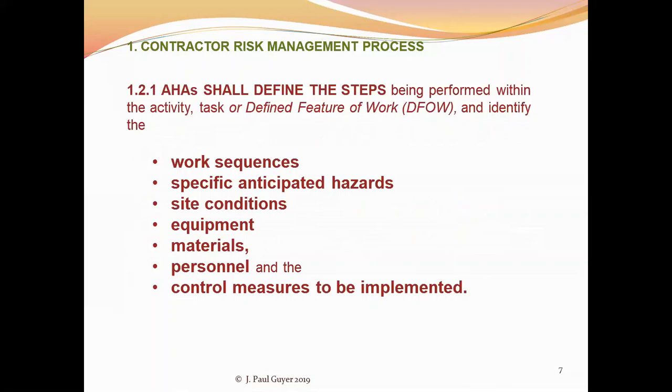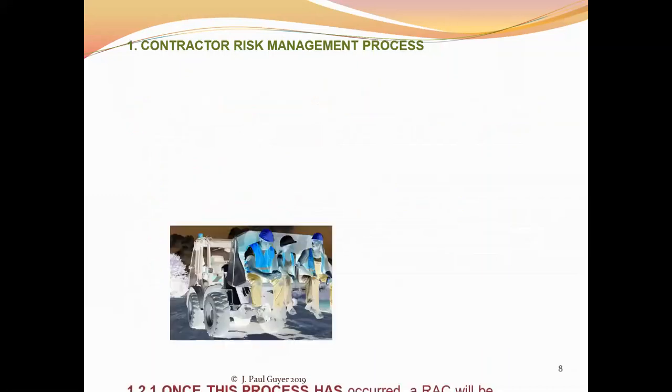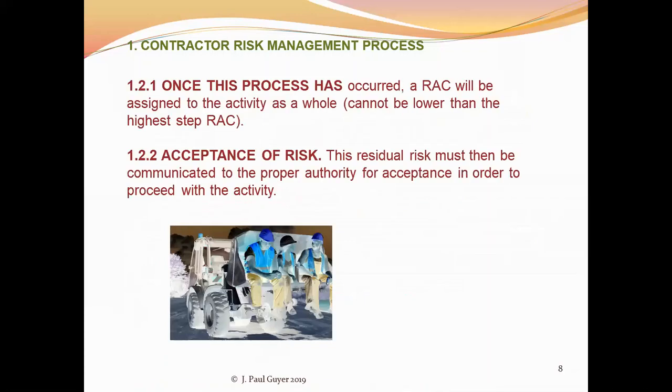And so you break the defined feature of work down into the tasks or activities, and for each task or activity, it has a number of steps. So that's the next level down, if you will, defining the steps that need to be taken.